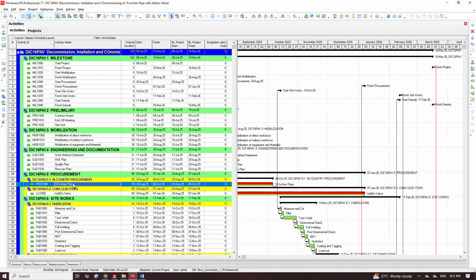I remember there was one eternizer column that was installed in LNG during the last shutdown, right? So it got to a point, the column, because it was coming from China, there was some strike, federal government strikes. As a matter of fact, they said the ship is not sailing. It remains there. So even at a point when it got to Nigeria, Nigeria said they can't clear it. They need different documents. So these factors coming up were not planned for, right? If you did not have enough allowance to accommodate it, it will make your schedule look miserable. In fact, you will see red everywhere.